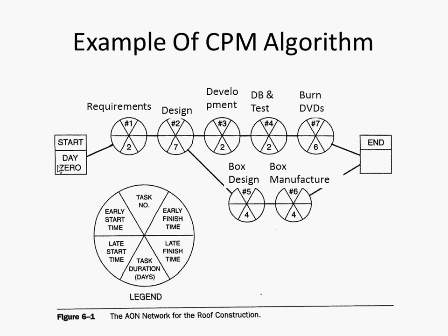This lower path, we have some slack on. We can actually delay this thing like 2 days, not be on the ball particularly with it. We could shift people from this component onto here to speed up the upper path if needed. This lower path, we have some give on. We don't have total give. If we delay it by 3 days, it will now be the critical path. But we have give on it. We have 2 days of give.